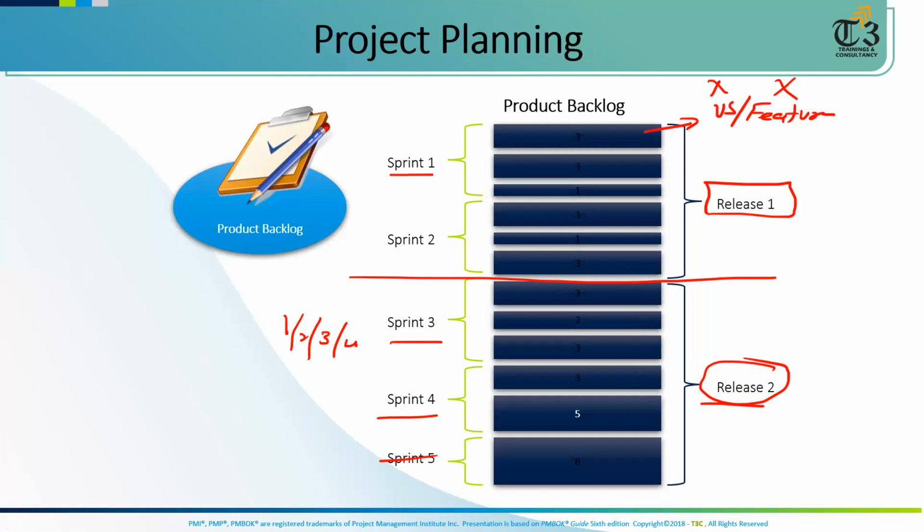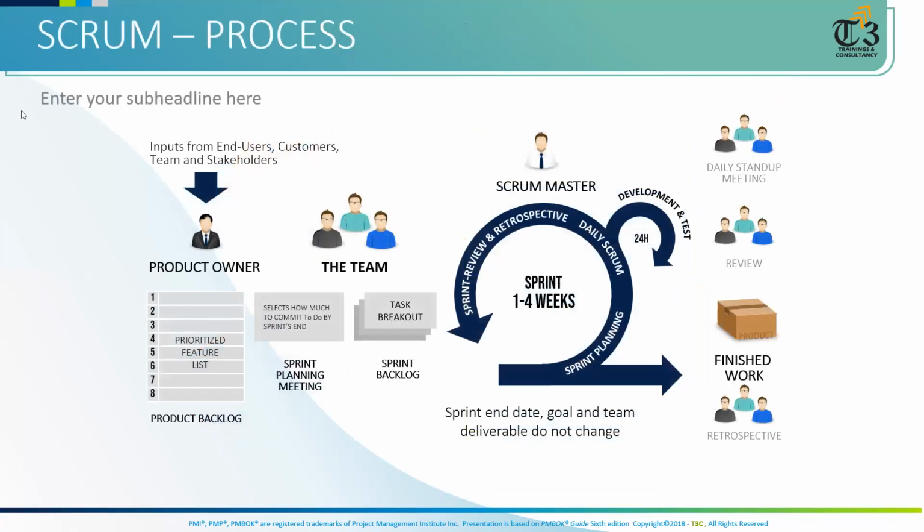And we give the initial release plan that, okay, we'll keep releasing accordingly. So what happened, Mr. Product Owner? That is what perfect Agile. Again, the same thing repeated. Mr. Product Owner will bring the requirements in the form of epics, and he will put it in the product backlog. Then this product backlog will become the prioritized product backlog. Prioritized means the user stories which give higher returns and have higher risk will be done first. Only the Product Owner has access to update it, and he prioritizes it.